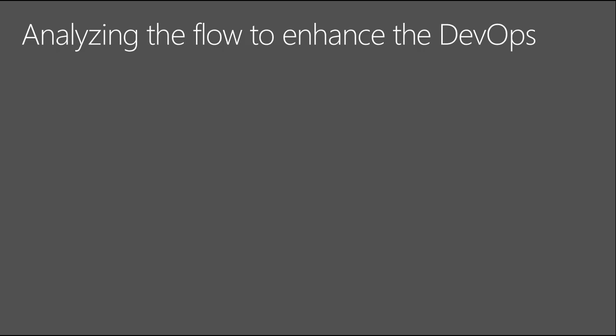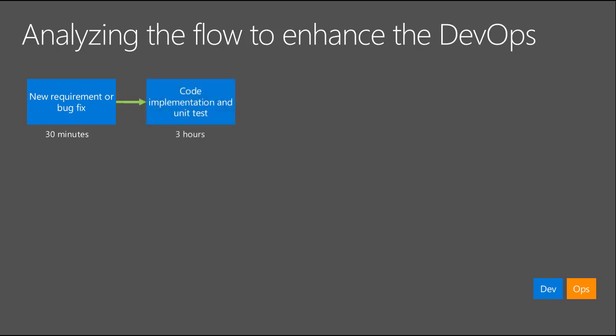First, I must understand the lead time and how long it will take, for example, to complete development of one feature from the beginning to deploying it in production. Once I understand it, I start optimizing that to the maximum. We start by understanding adding a requirement to the backlog. We look at how long it will take to refine this requirement, then the time it will take to develop the code and test the application, then requesting a QA environment, so deploying the application to provide, for example, integration testing.